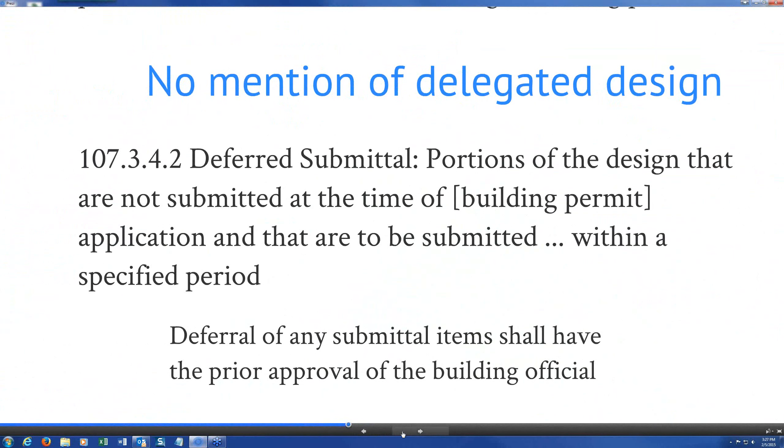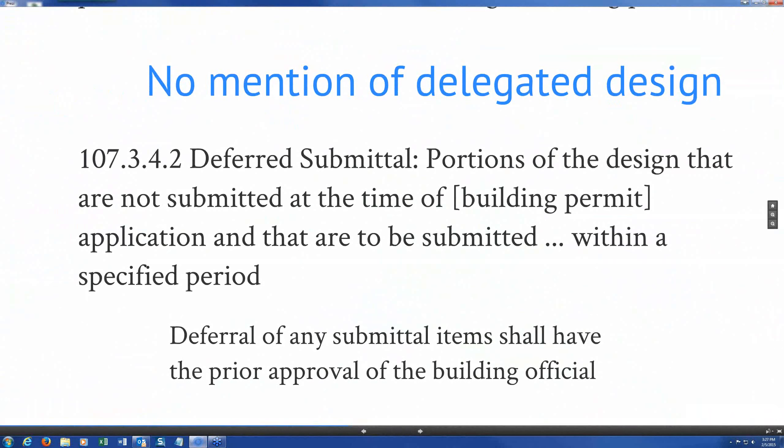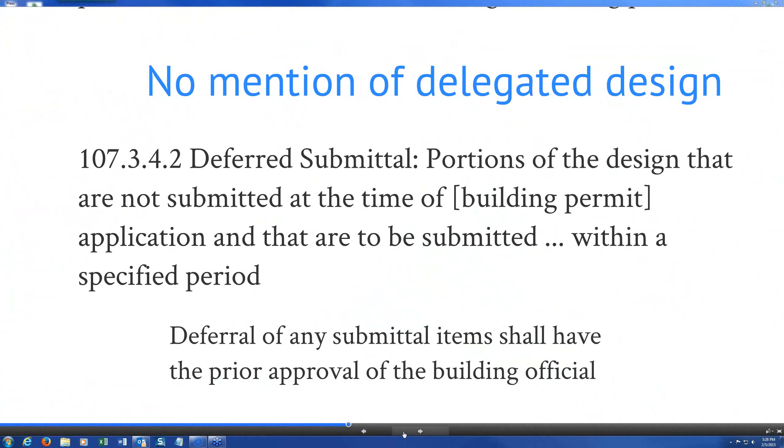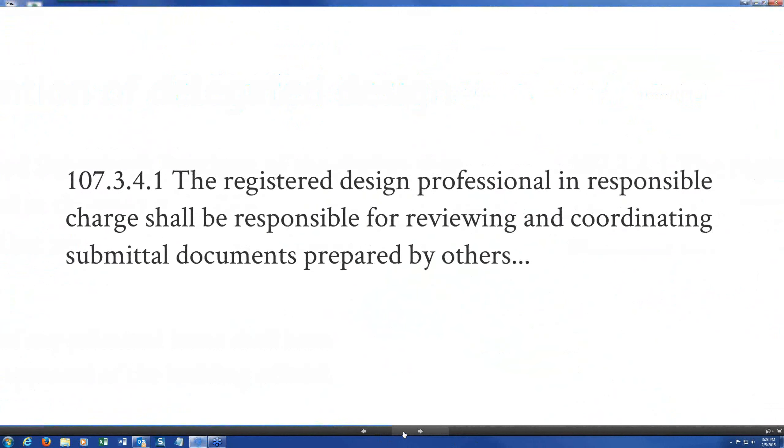So they are construction documents for permitting, but they are not contract documents between the contractor and the owner. And we've got everybody confused on that one. Correct, not contract documents in the term that the AE did not prepare them. Right, but they are construction documents. So let's go to that next slide. But I did want to mention you didn't deal with this second paragraph here, the deferred submittals. They're supposed to have prior approval, and they're actually supposed to be noted on the contract documents that are submitted for permit.